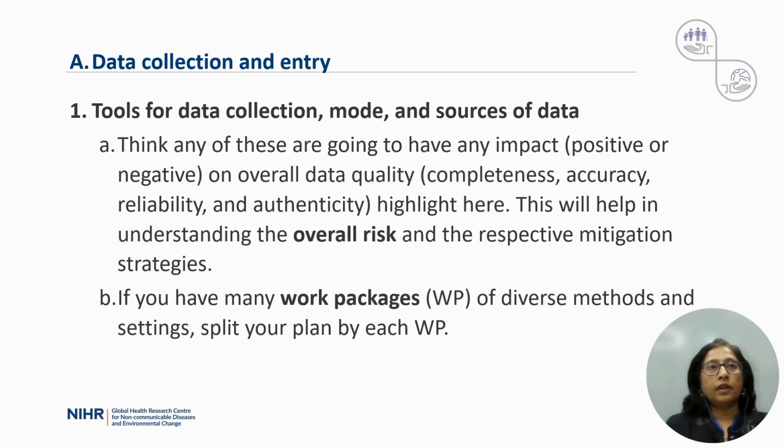In reality, every one of you is working on projects which have several small work packages. Each work package might involve various methods of data collection, and the settings might also be different. So when you work with a complex research project of that kind, it would be helpful to divide it into various work packages. It's possible that in one work package you're going to collect information from the health system using a semi-structured questionnaire. Another package could be a household-level survey, where you visit the households and use electronic data capture.